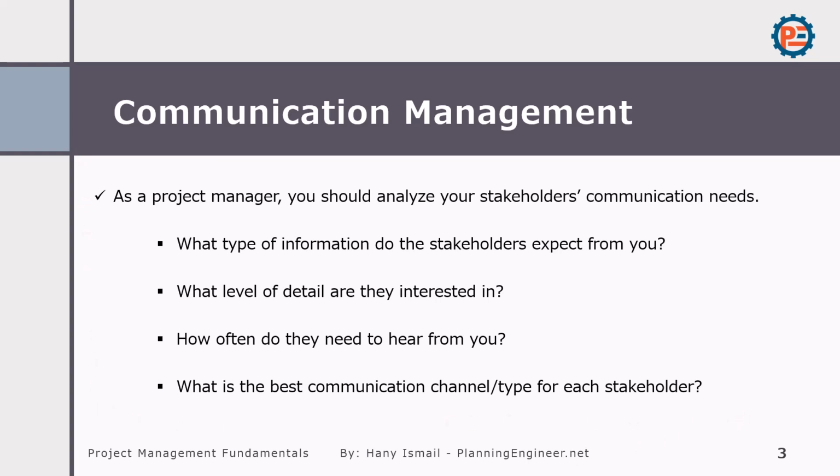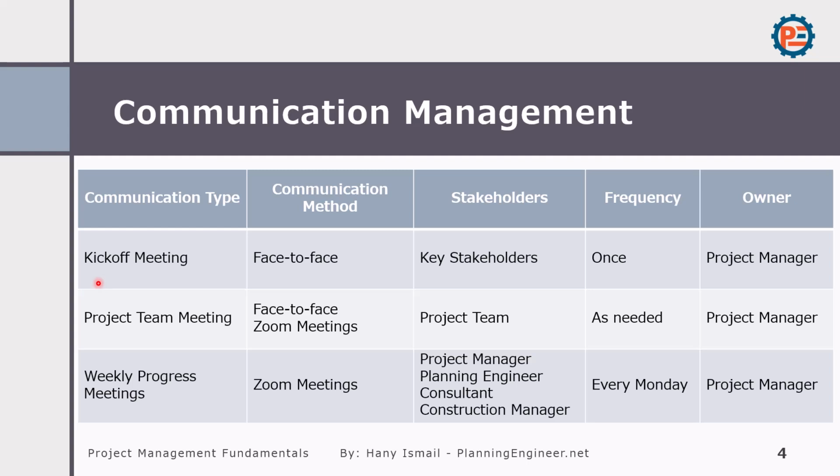Let's make it simple. For example, if we have a kickoff meeting, the communication method will be face-to-face. Stakeholders will be the key stakeholders in the project. The frequency of the kickoff meeting will be once. This will be done in every project or maybe every phase. The owner of the meeting is normally the project manager.